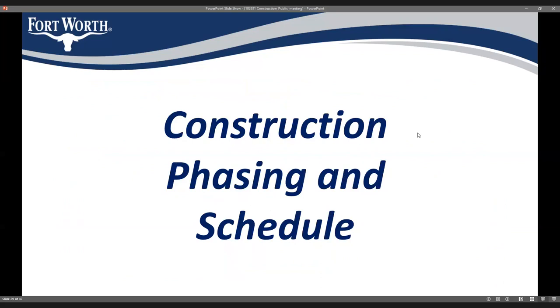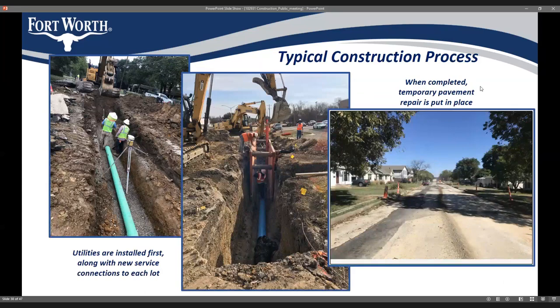Now I'll talk about the construction phasing and anticipated schedule. Utilities will be installed first — water lines on all streets and the sewer line on Uvalde. After they are installed and connected, there will be a temporary paving patch put in place until the street is ready to be paved. You can see in the third picture the asphalt patches that provide a smoother driving surface between utility installation and actual road paving.